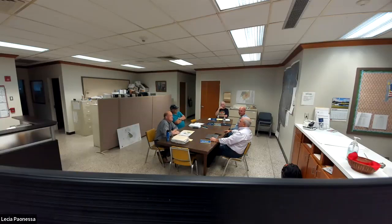So what'll happen, let's say at the end of the day, let's say we have, I don't know, what is it, 400,000, something like that? No, 350, 450. Okay. So let's say there's 350 plus 100 for Newfield, so 450 out there. We spent 150 on the job. When we're done, it's a deduct change order from them back to the town. It's over. That's why it's better to keep it the way it is, and that's the way it's intended, because at least there's a check. It just prevents somebody from going cavalierly, oh, we got 400, I can spend it.